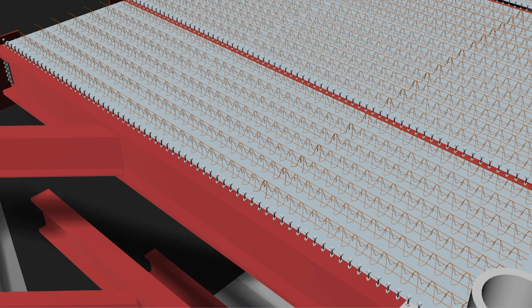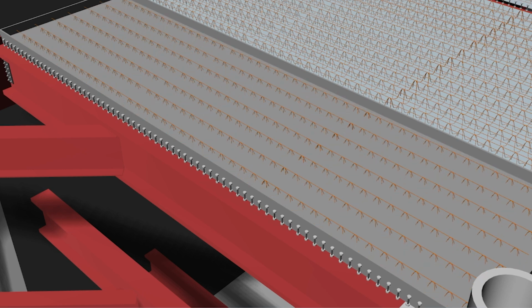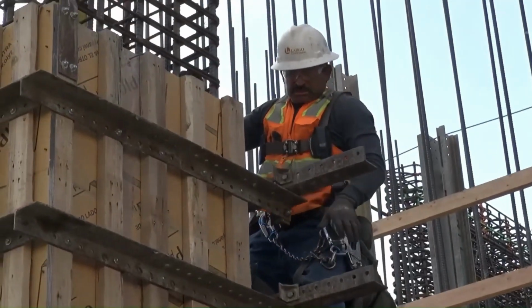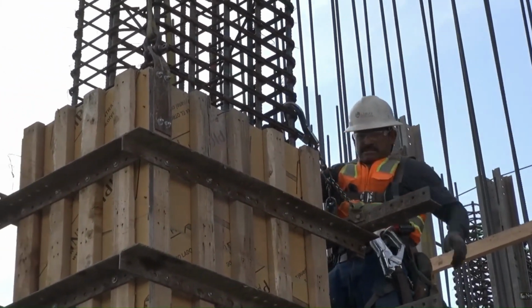Laid over beams and girders, the deck plates support the initial load during concrete pouring and serve as temporary formwork until the concrete cures. For interior columns and walls, concrete was poured using conventional formwork.